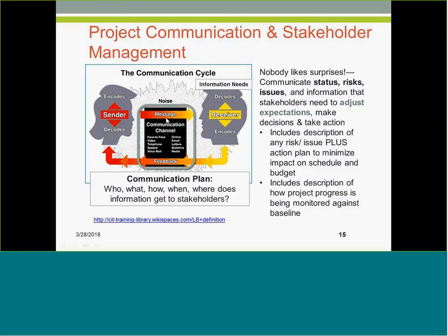As we step into project communication management, then we'll really make a very detailed plan on how to communicate with the stakeholders based on their, number one, information needs, and number two, their communication needs. Because remember, not everybody has the same communication needs, whereas it would be okay for you to maybe text the project sponsor, the vice president of finance, for example, where other information requires an email, right? This is the kind of information that we want to catalog.